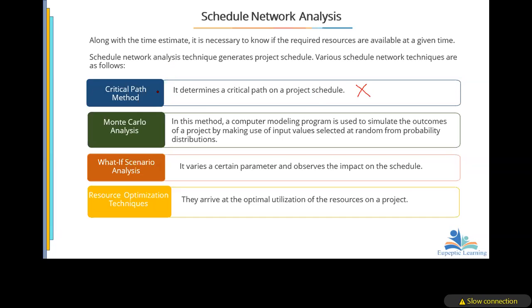Critical path: the longest path in the project network diagram, but the shortest possible time for the project to end. Longest path because it tends to have the longest duration.